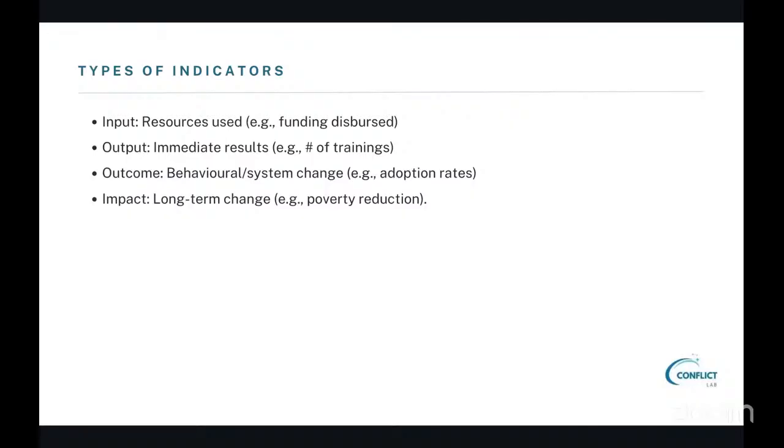You can, for example, take tests to see what their immediate result was. When you train a group of people regarding anything, especially in capacity building projects, the output is quite immediate. You can take tests and you will have an answer how much they have learned. And then you have outcome, which is, okay, how many of them have used their training in their work, for example. So in that way, you might have to take a survey maybe after 3 months or 6 months to see how many of these people have used the training's learning in their work life or whatever that you train them on.